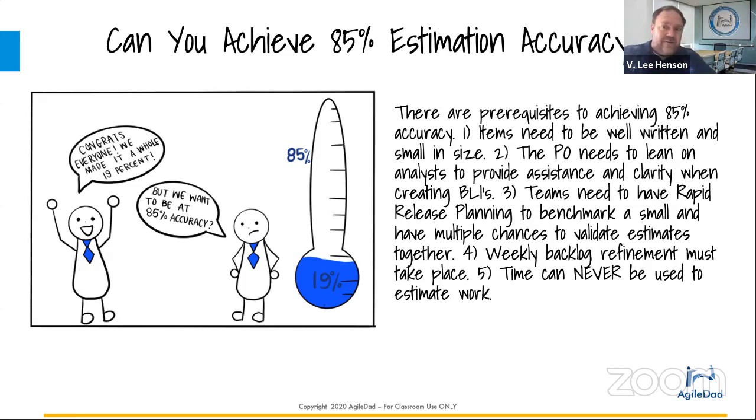I'm okay with using time as a metric if you say that based on our estimations and release planning, so if we do a proper release planning session, we have 1,000 points. Let's just say we have 10 teams that are going to be working on this, and each team is capable of doing 100 points a sprint. Impossible, right? I was hoping you'd say that. No team's going to do 100 points a sprint. Let's just say the teams can do 20 points a sprint. So if you have 10 teams that are doing 20 points a sprint, that becomes 200 points. If it's 1,000 points, it'll take those 10 teams 5 sprints to finish that. If we're doing 2-week sprints, that's 10 weeks. There you go. So the point I'm trying to make is you can figure out how many sprints it is.